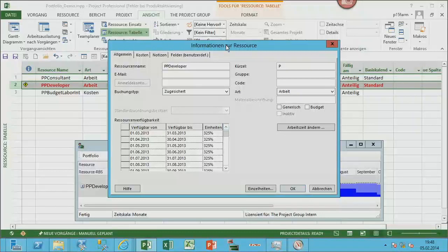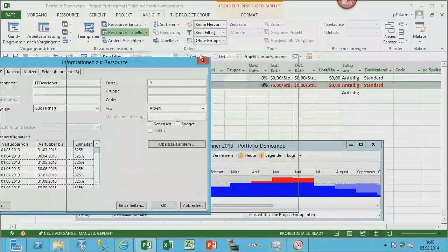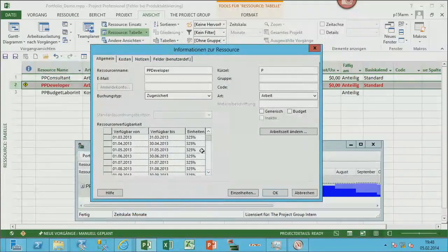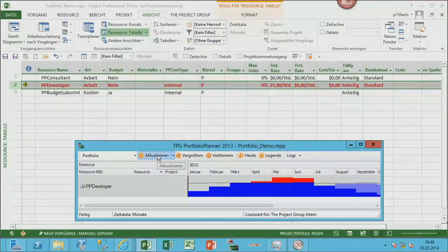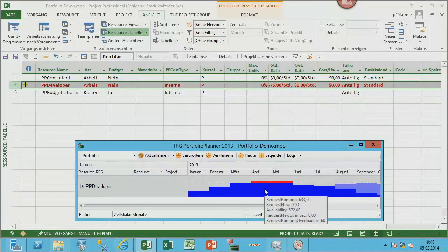So what did I say? May and June? Yeah, right, May and June. So let's increase the availability of developers in June by almost 1 person. And in June, we go up to 500. We just hire people, or give out contracts for something. And then, again, refresh. And you see we have almost solved everything.